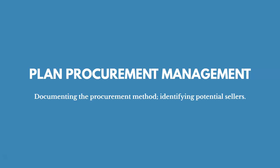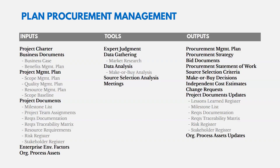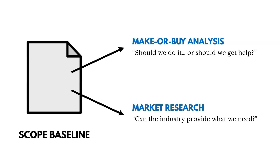With Plan Procurement Management, we're documenting the procurement method and identifying potential sellers. The key tools are market research and make-or-buy analysis. Make-or-buy analysis determines whether we should make something ourselves or buy it from someone else — focusing on what we do best. If we're not good at something that needs to be done for the project, we may need to buy it from an outside vendor.